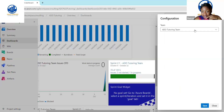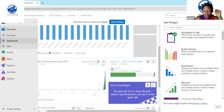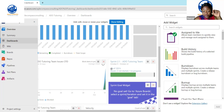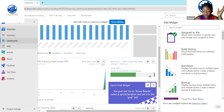This is the Sprint Overview widget — it's telling us we have two issues, two not started and one in progress. For a large team, it will tell you how many tickets are in the sprint and how many are in progress. It also shows you hours: 70 of 120, meaning the total available hours are 120 and you've used 70 so far, so we're on track. If the bar starts going all the way to the right, it turns yellow and red to indicate there are capacity issues on your team.